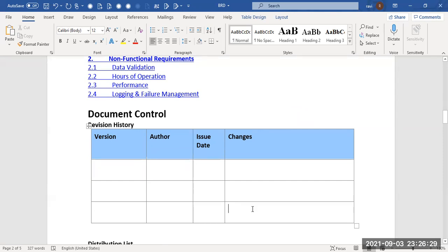Or you can create another change request, a simple document with other enhancements. If some requirements are not clarified, you get the BRD signed off, then create another change request, a mini BRD, and get those additional requirements signed off.